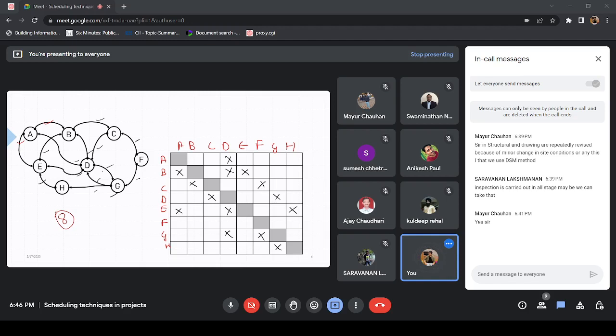So let's try to find the loops in this case. As said, first DG, right? DG is one loop. Can we see any other loop? B gives information to C, C gives information to D, and D gives information to B, right?